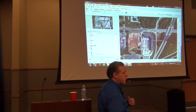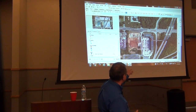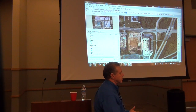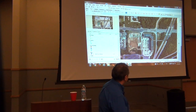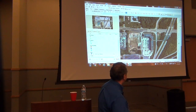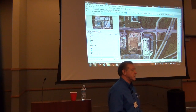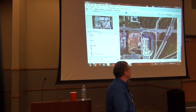Not likely I'm going to need a crane in this project, but if I was a general contractor and I was going to stage this project, you can see the site on the left, where would I put the fencing, the security, the job trailers, where does the crane park, where am I going to have egress and exits, et cetera, concrete washout areas. You can just go crazy with your imagination here, but all I did was go to Google and put in the address, save that as a JPEG, and put it in on-screen takeoff.